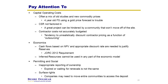From the operating cost side, watch out for a mix of old studies and new commodity prices. There's been considerable inflation on the cost side. There's a tendency to say the costs aren't that bad, let's keep them here — expecting gold at $1,800 in three years, so using the cost of production from four years ago. That doesn't make sense, but it's something that's presented to you and you've got to watch out for. On the CSR side, if you've got somebody sitting on the side of a hill, you've got to move them, and that needs to be built into the OPEX and the CAPEX.